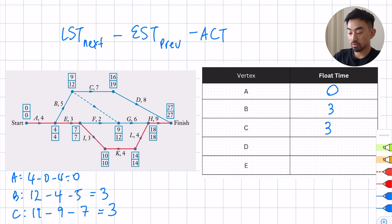Let's look at D now. So D is here and I want to find the float time for D. I look at the next which is 27 minus the previous early which is 16 minus the activity which is 8. So 27 minus 16 is 11 minus 8 is 3. So also 3.